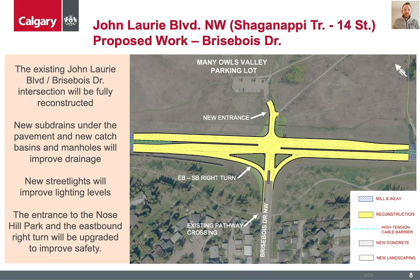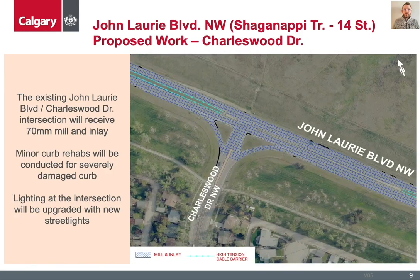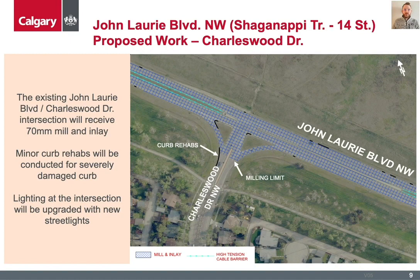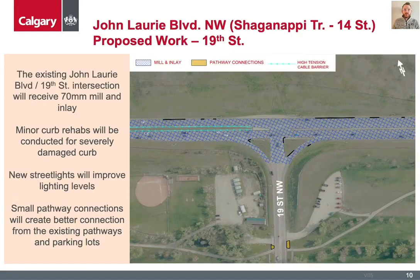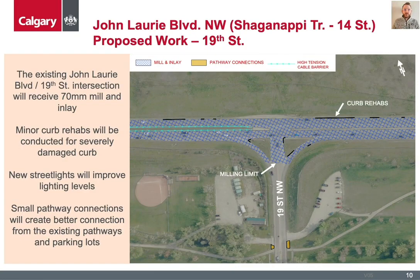High-tension cable barriers will be installed both west of the intersection towards Brenner Drive and east towards Charleswood Drive. Rehab of the Charleswood Drive and John Lurie Boulevard intersection will be completed through mill and inlay at the intersection to the south limit shown on the image, as well as the removal and replacement of severely damaged curb and gutter within the intersection. The intersection will also receive upgraded lighting to improve the lighting levels and the safety of the intersection. High-tension cable barriers will be installed west towards Brisewa Drive and east towards 19th Street. Rehab of the 19th Street and John Lurie Boulevard intersection will be completed through mill and inlay at the intersection to the south limit shown on the image, and the removal and replacement of severely damaged curb and gutter. The intersection will also receive upgraded lighting to improve the lighting levels and safety of the intersection.